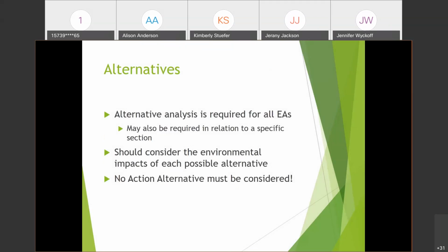Alternative analysis is required for all environmental assessments. It should consider the environmental impacts of each possible alternative. You should examine and recommend feasible ways in which the project or external factors relating to the project could be modified in order to eliminate or minimize adverse environmental impacts.